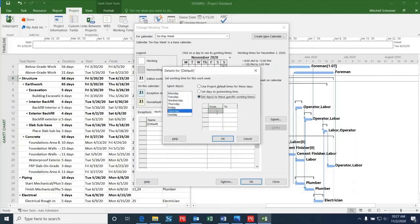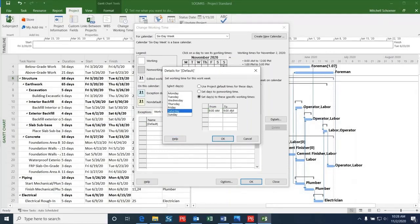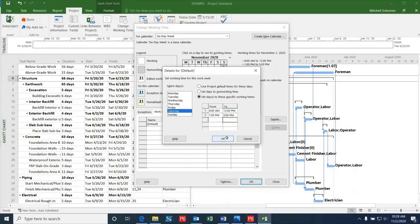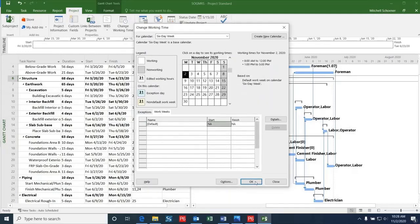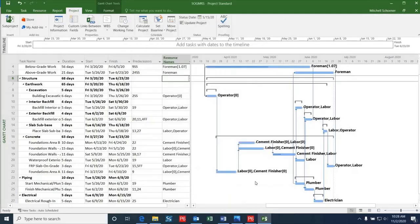I can now add in the working times for Saturday, which will be 8am to 12pm and 1pm to 5pm. I've added the hour gap between noon and 1 to show a lunch break within the day. Now that I have this filled in, I'll click OK and then click OK again.